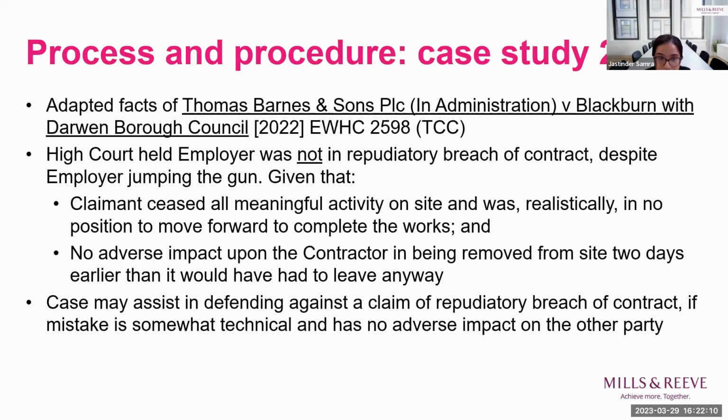these were the facts of Thomas Barnes and Sons. And as an aside, that case is really wide-ranging, with the judge making points and determining points relating to common law termination, the weight to be placed on witness and expert evidence, and also concurrent delay. But for our purposes, the High Court held on this point that the employer was not in repudiatory breach of contract, despite putting the second termination into effect 2 days before it should have.